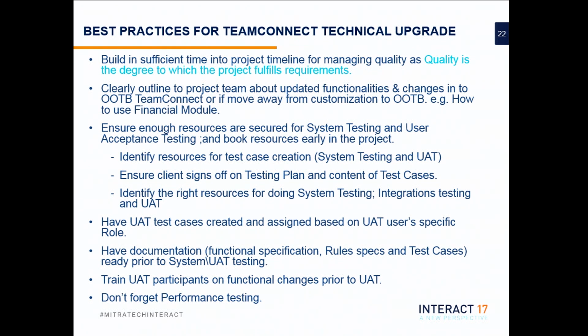You probably want to identify those resources early in the project so people are aware who's doing what and how it's done. You want to have all of your scenarios that are applicable to whatever you're upgrading ready early in the game. You want to have the system testing scenarios and UAT scenarios ready, confirmed and reviewed by your business system owners.